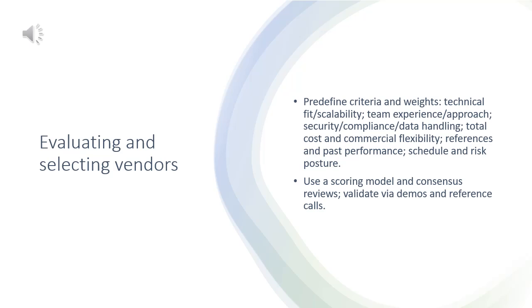Decide before you read proposals. Define criteria and weights aligned to objectives. Technical fit and scalability. Team experience and implementation approach. Security, compliance, and data handling. Total cost and commercial flexibility. References and past performance. Delivery schedule and risk posture. Use a scoring model and consensus meetings.